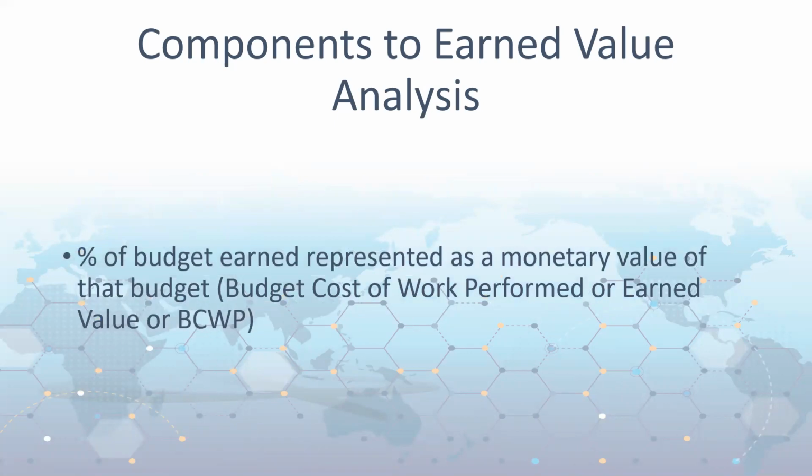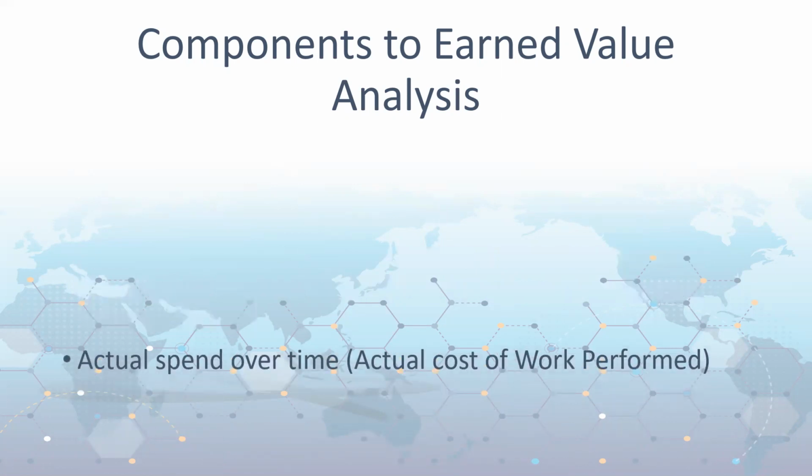Then as we start to do the project, what we will do is assess how much of that progress we've earned. What percent complete we are, essentially. And we take that percent complete and we multiply it by the total budget to get a representation of what we earn. Now, the trick there is a valid percent, trying to get project managers, quantity surveyors potentially, to assess percent complete. What's the basis for doing that? And so we're going to show you some methods in UniPhi that we use. And this is the crucial bit, because invalid percent complete basically renders this whole thing useless, absolutely useless. The other challenge is getting the next one, which is actual spend against that profile.